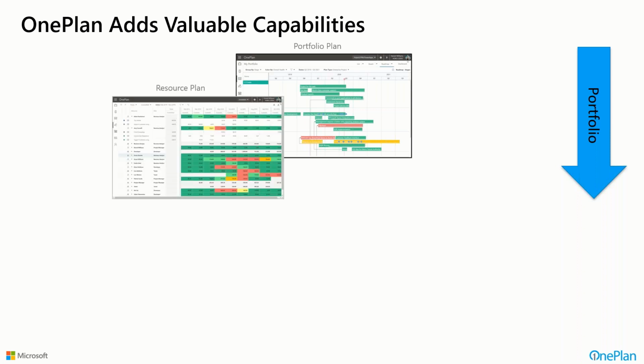Resource capacity planning is big. One of the bigger pain points that people come to us for that we talk to out there is that, yes, we're executing on project plans, but maybe we're committing to things without fully realizing, do we have the capacity or the bandwidth to actually succeed at what we're committing to? And the idea of being able to put capacity plans in, whether they be more top-down plans, saying I need such and such headcounts by certain types of resources or specific individuals across periods of time, or maybe more bottoms-up resource planning, that is the actual schedules and the work plans that are rolling up from those detailed task resource assignments, and seeing what the aggregation of that looks like. What loads are we putting on from the bottom up? And even comparing those things from the top down and the bottom up, should an organization want to do that.